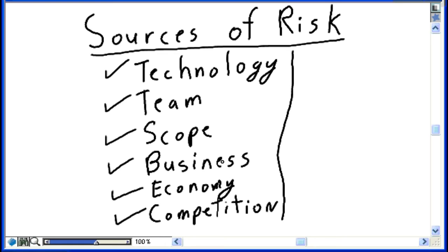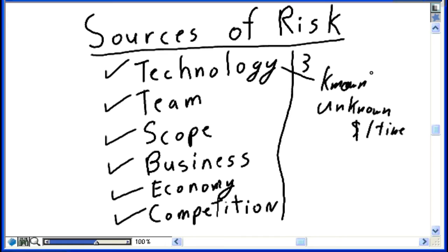As we talked about, there are known risks. So we identified 3 risks associated with technology: server, inappropriate technology, bandwidth. Are there other unknown risks associated with technology? And chances are, yes. You do not have time during project planning. You do not have the knowledge during project planning to identify all risks associated with technology. So there's always going to be unknown risks. And again, you need to allocate the time, the dollars to deal with both the known risks